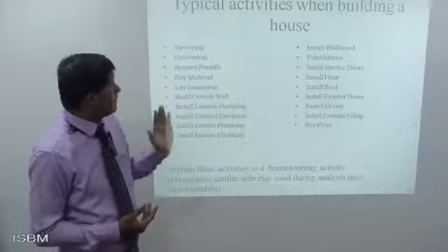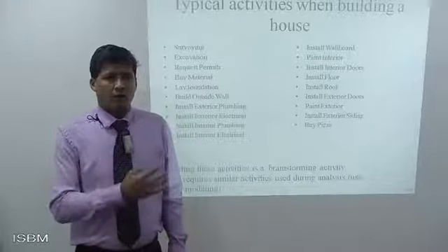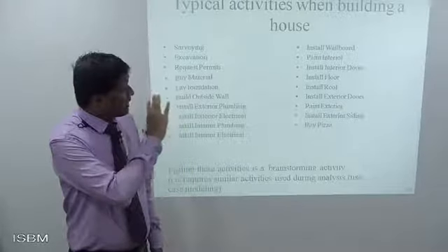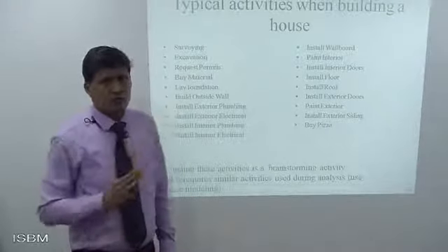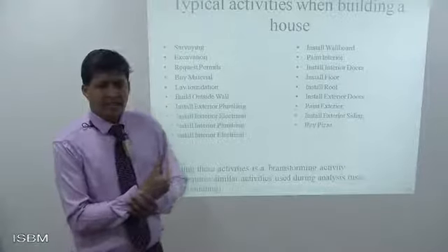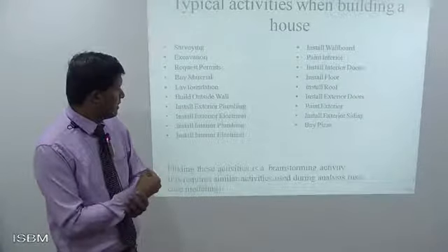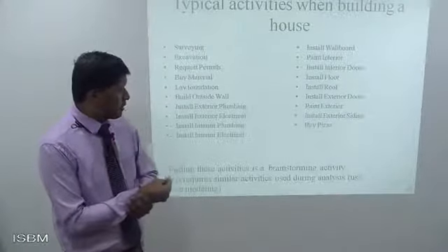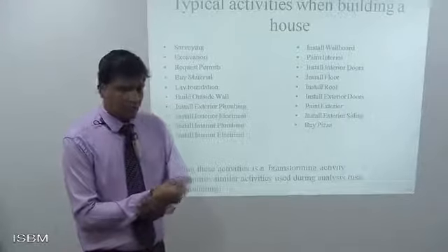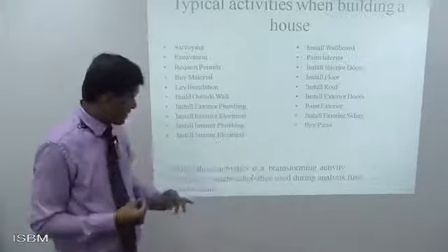So let's first figure out the total activities when it comes to building a house. Surveying, excavation, requesting permits, buying material, laying foundation, building outside walls, installing plumbing, roofing, flooring, electrician, the entire set of activities.